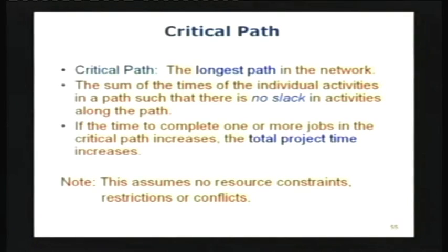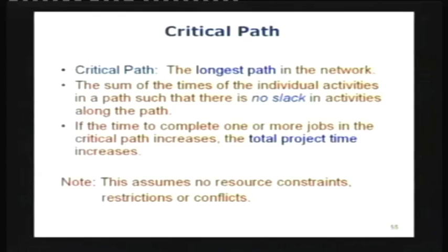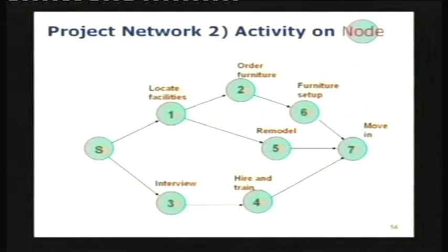Of course, in the CPM scenario, and also in the PERT scenario, you do not assume any kind of constraints due to resources. You assume lots and lots of resources are available. The only dimension you're looking at here is the time to finish, given lots and lots of resources. No limits on budget, no limits on basically resource availability. You just want to see most optimistically when can I finish this project. That's the goal. Let's see how we do that.